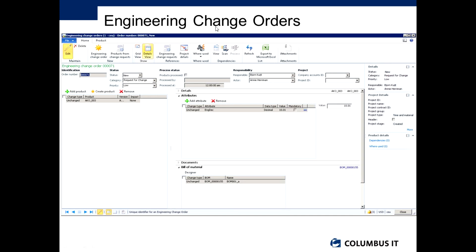One of the key features about engineering change orders is to look at the dependencies, and that's this area here. With this part we can look at the dependencies for this particular change. For example we may be going from a version A of a product to a version B of this engineering change. So what the dependencies will allow us to do is actually scan to find any version A products that are out there - do we have a version A product that's sitting on the shelf, do we have a version A product that is currently in manufacturing, have we got some sales orders for version A. All of these are dependencies that we're about to impact because we are going to a version B of the product.